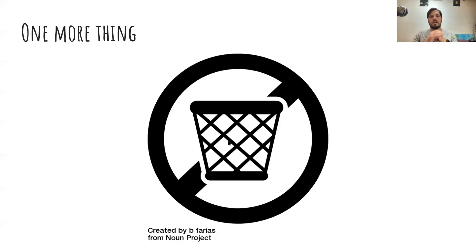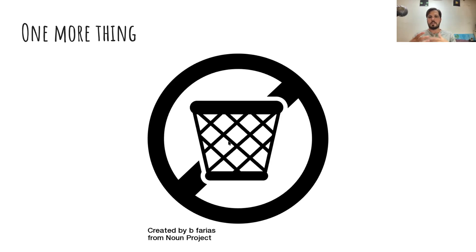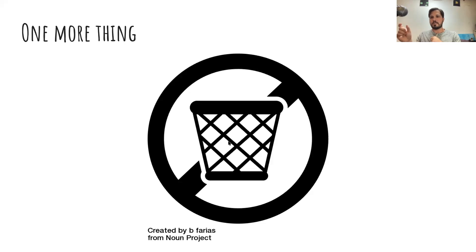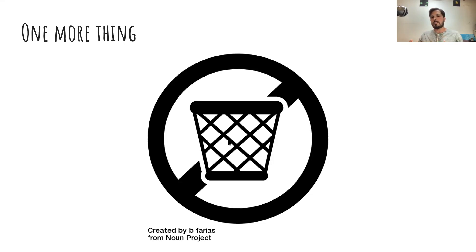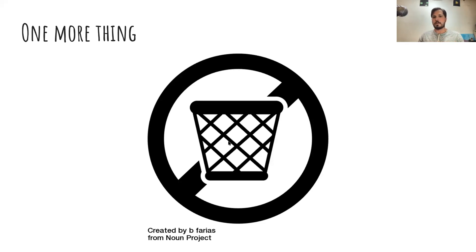But you can't just pretend work didn't exist, because if you do, you don't preserve the throughput numbers and can't trust throughput to stay stable. All work must finish — you have to actually mark that work as finished, move it into the done state so it counts towards throughput. And when you do, you should also mark it as something you decided not to complete, so you can understand why you started those things you later decided not to finish.